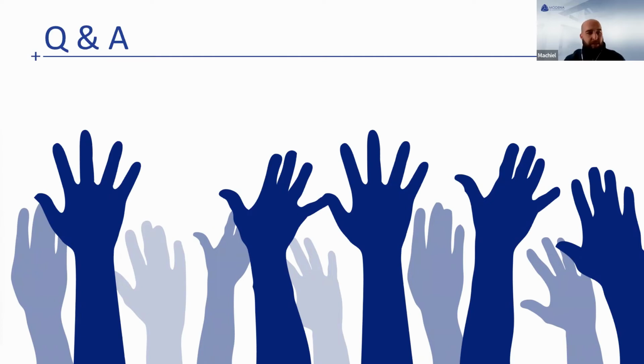One of the biggest challenges with an email way of resolving these items is that someone who is not CC'd on the email list on the RFI will not be aware of what is happening on it, and they might need to give their input. Within the ACC system, once an RFI has been raised, you can comment and address someone onto an RFI to give their inputs into it. So it's really a process of keeping it as a standardized workflow and making sure the correct people get it addressed.